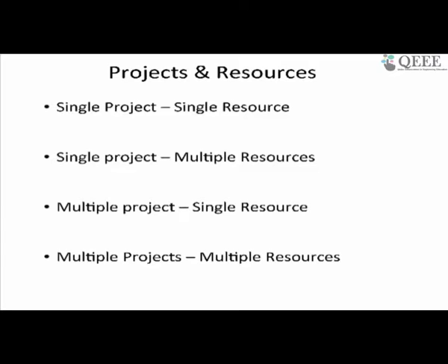manage. But as companies get bigger, or there are region based companies, they cannot look at only a single project and manage resources only on that. They will typically have multiple projects in a region. There might be very valuable resources which you have to then manage across your several projects in a region. For example, it could be a heavy crane like we talked about. The heavy crane cannot be allotted to a single project and just be idling in the project. It has to do its jobs on multiple projects, and allotting that resource to multiple projects becomes also a challenge.